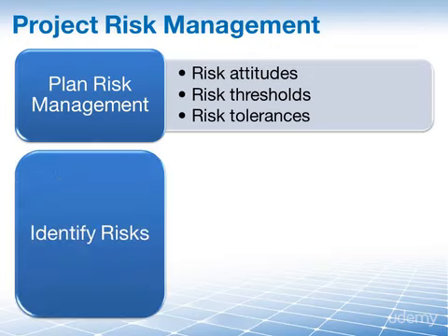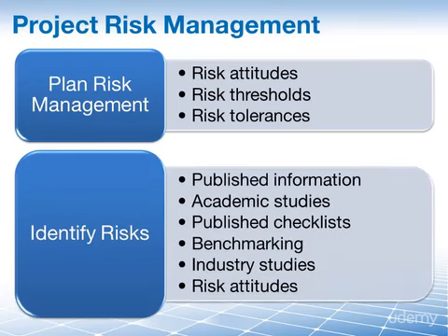The second process, identify risks, has a few more, as you can see here. There are published information, academic studies, published checklists, benchmarking, industry studies, and risk attitudes which need to be taken into consideration as we identify the risks, the many risks on our project.